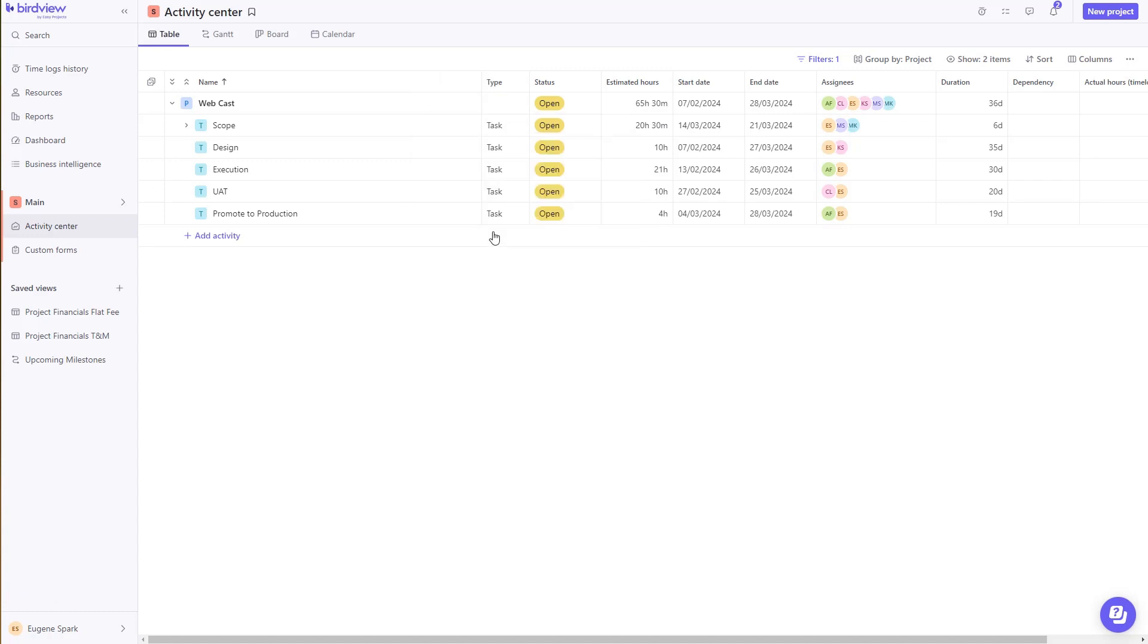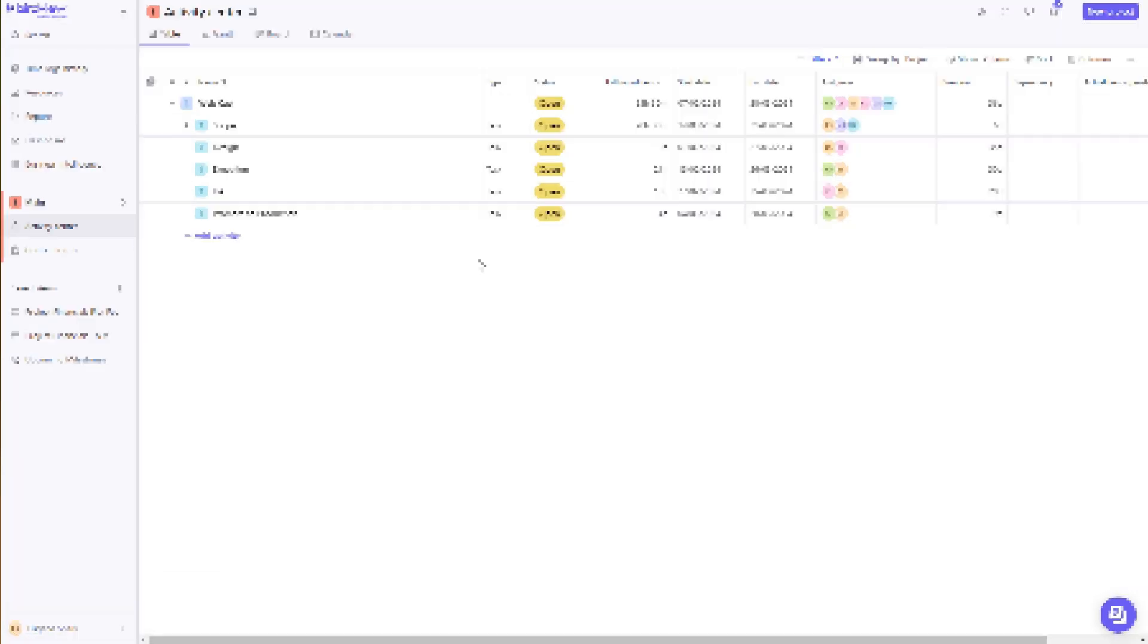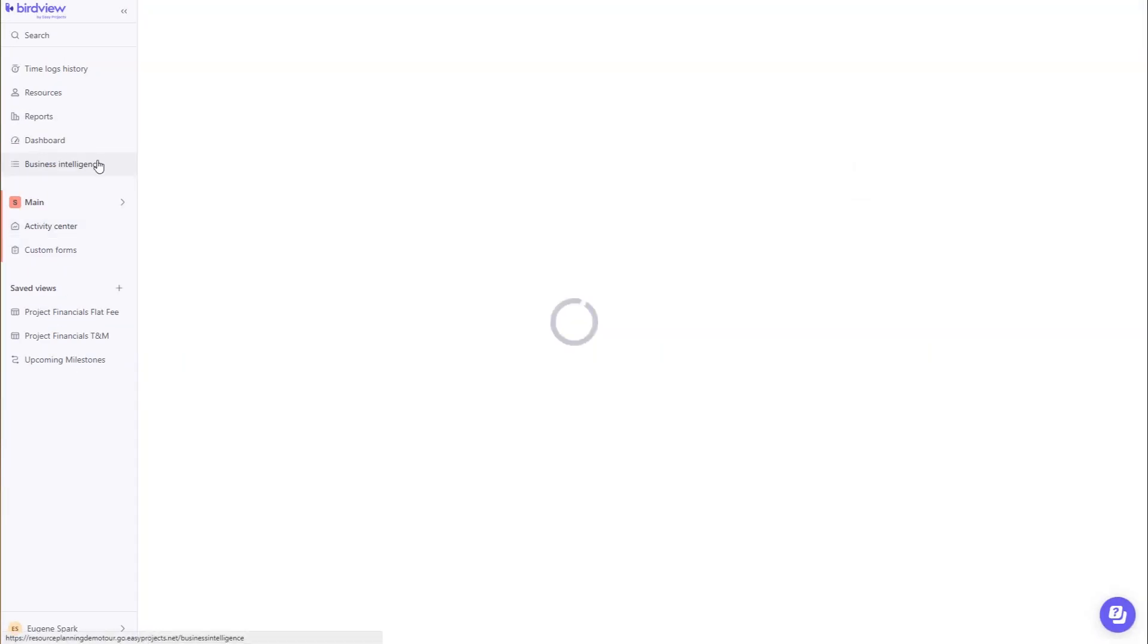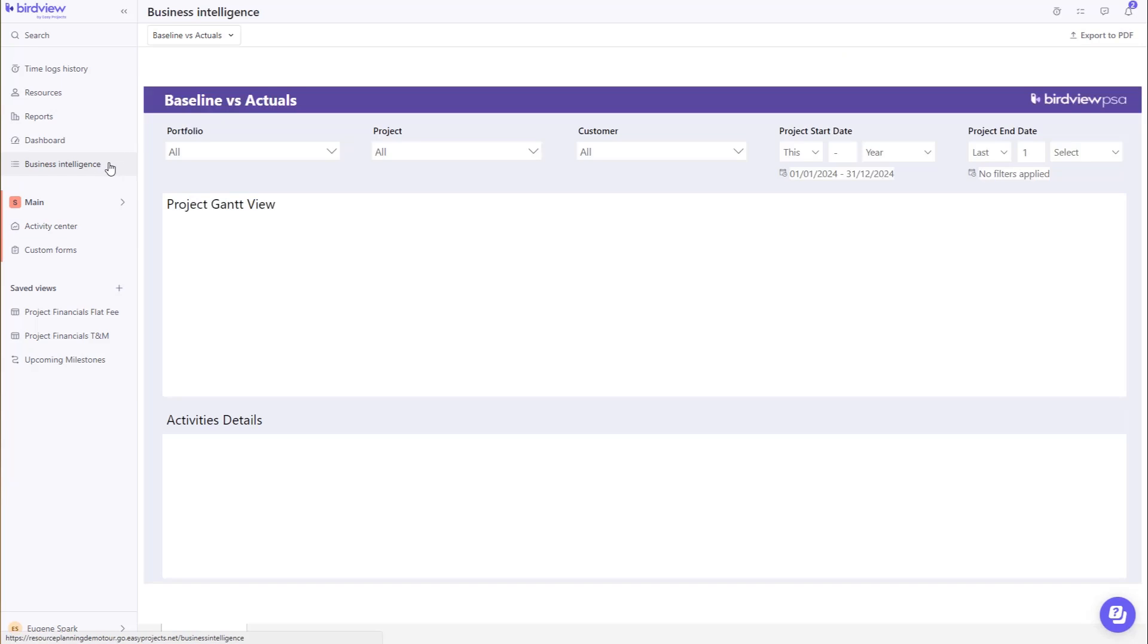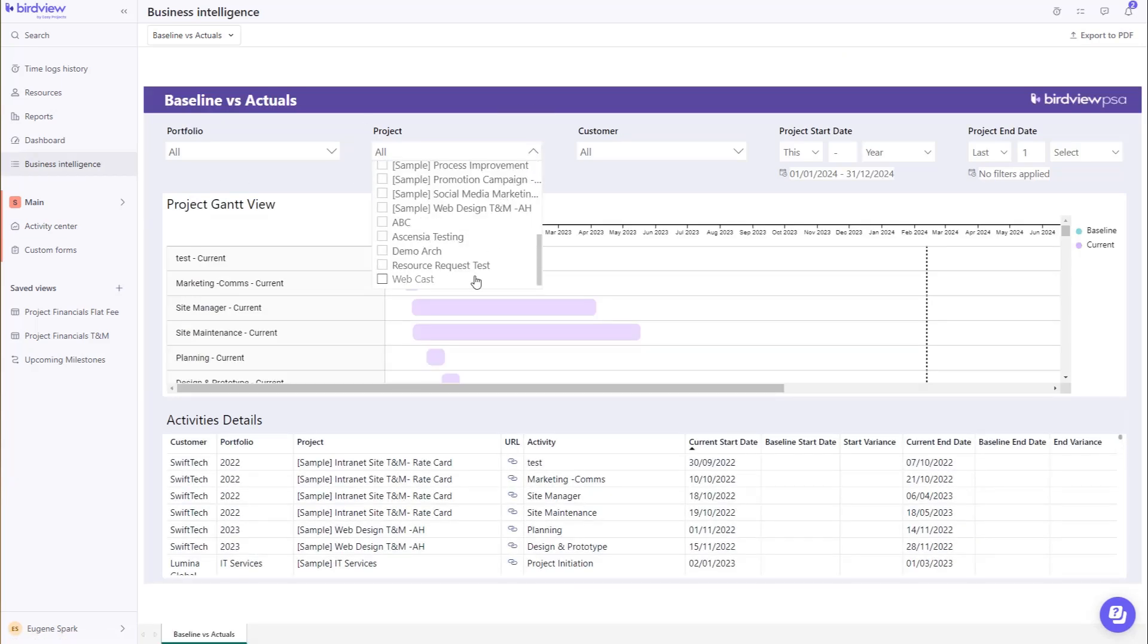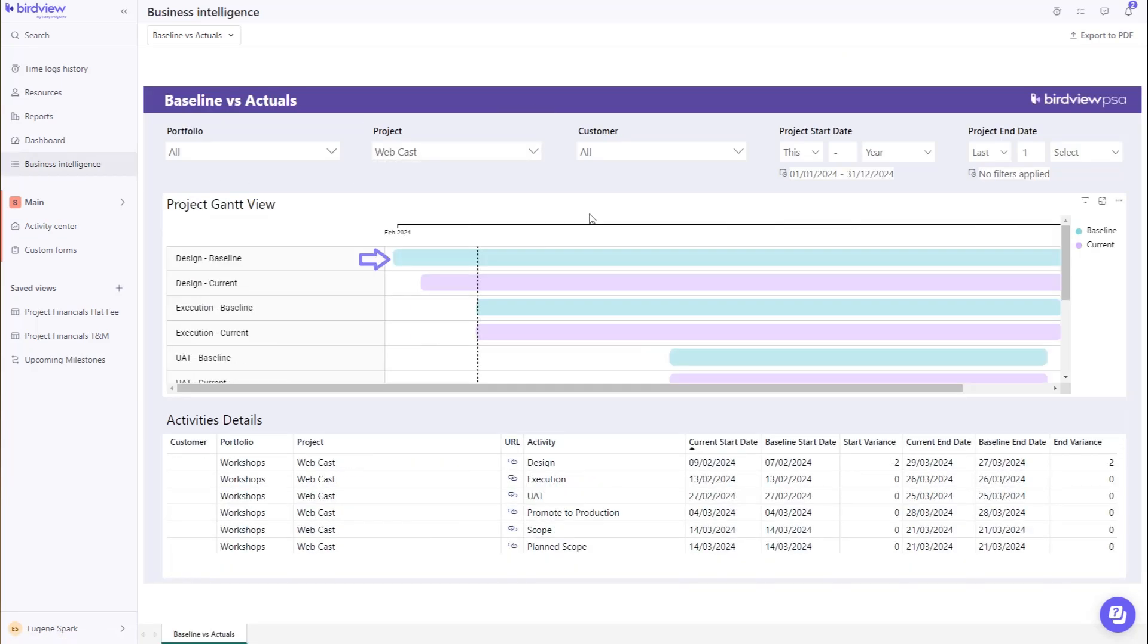Select the capture baseline, and BirdView goes to work to capture all of the baseline metrics, and a powerful Power BI report will summarize your baseline versus actuals, so you can see the variances in real time.